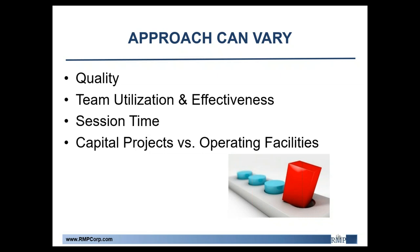The early stages of a capital project really focus on higher consequence scenarios to support decisions regarding fundamental design issues — the earlier you address a potential design issue, the cheaper it's going to be to fix it and perfect the design. Later on in the capital project, the objective shifts more towards detail-oriented things as more process safety information becomes available to the team. In the later stages, you should be able to focus on finalizing and vetting design details with all that additional information.